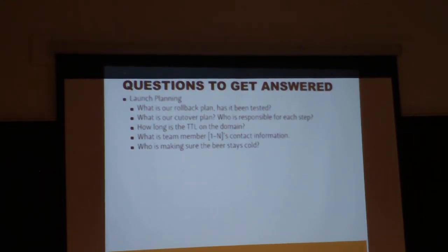Make sure you're doing these at a certain time when it's low traffic, or at least so you can have enough time to fix things before the traffic starts to pick up. Or let's say you're building a college site and enrollment is going to start on a certain date. Well, make sure you do it at least a week before that, maybe even further into the summer, so that you're not doing it days before students are going to actively start using the site. You get that nice window. Because you're going to launch with some bugs. You're going to find new bugs.